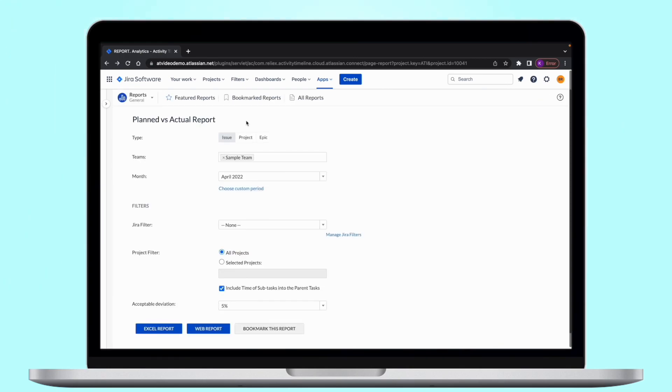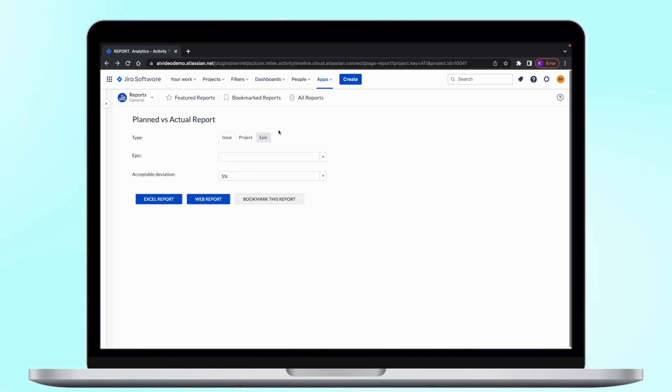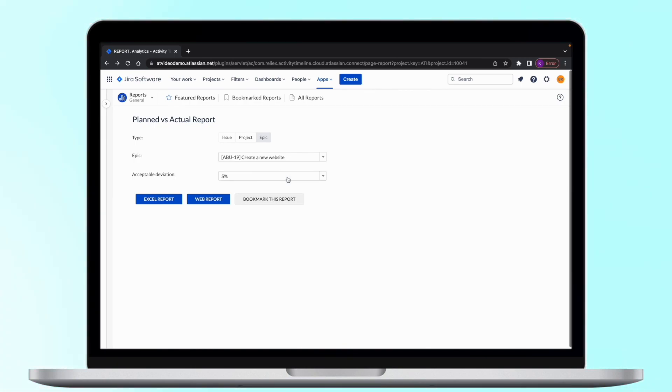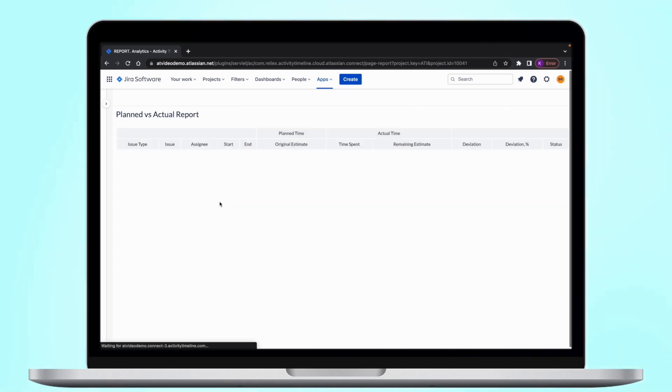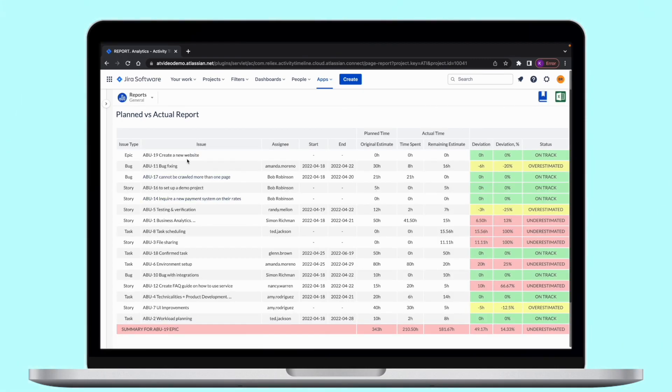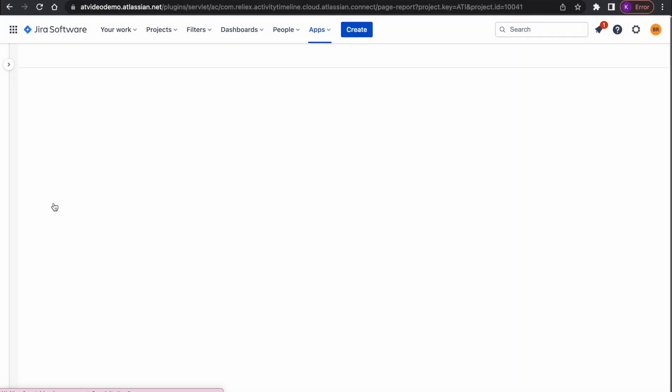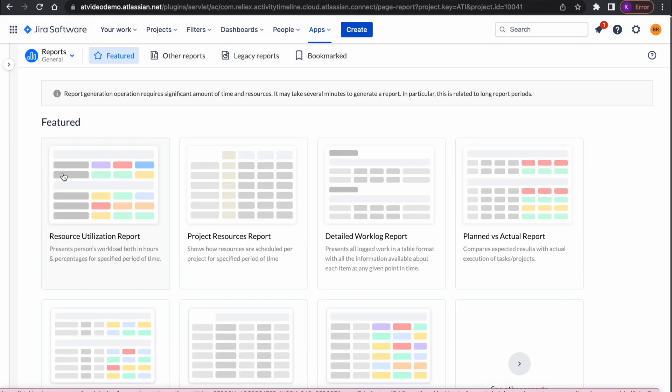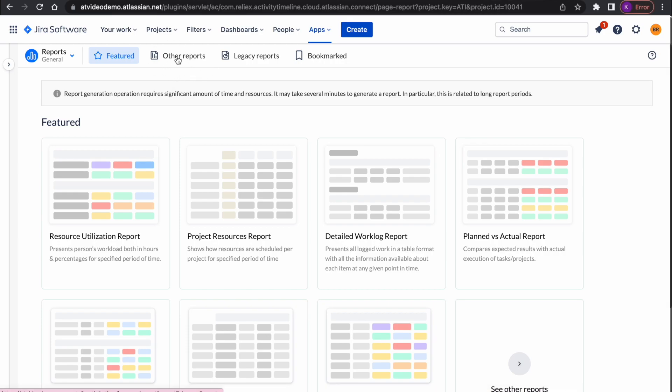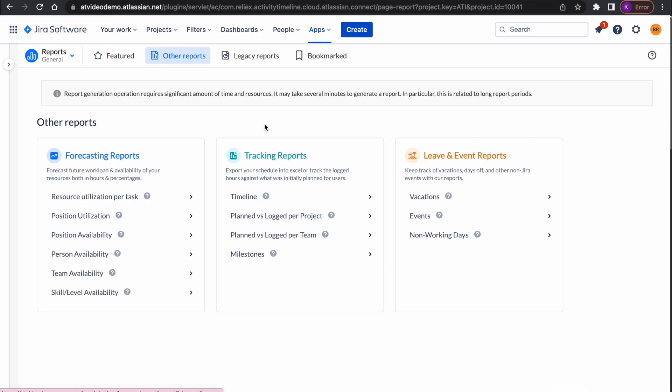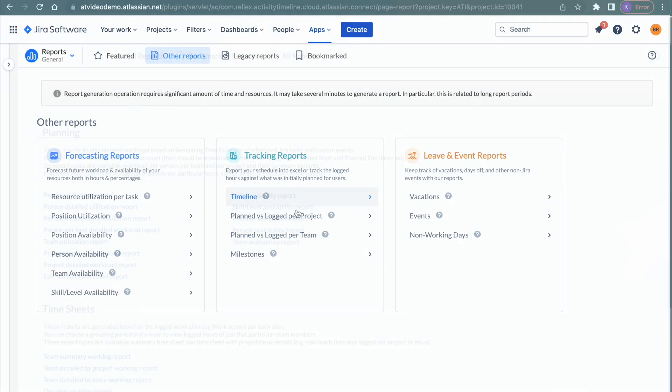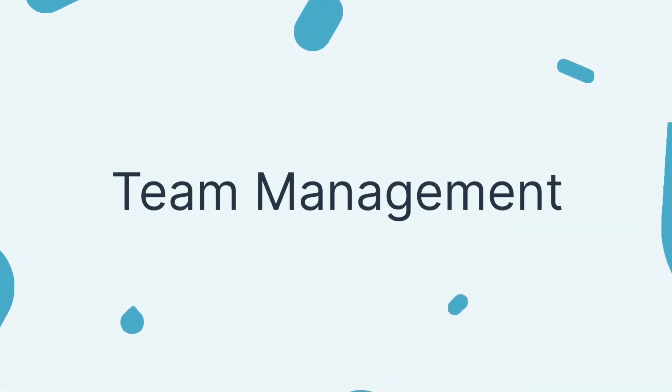Planned versus actual by epic. In case you use JIRA's epic functionality, you can also generate planned versus actual report to track the progress of the epic, which takes into account all of the stories, tasks, and subtasks in any particular epic. Apart from these reports, we have a variety of other in the all reports section, which could be useful for some specific cases.